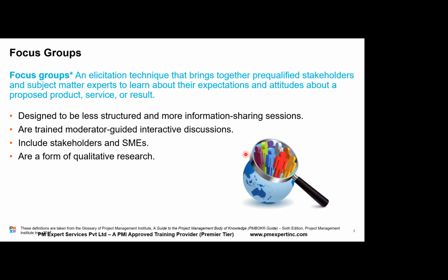Now, the second technique is focus groups. What are focus groups? Focus groups are pre-qualified stakeholders who are relevant to the project, and the focus group activity is facilitated by a moderator or a facilitator. The key outcome of a focus group is opinions from these pre-qualified stakeholders and subject matter experts. The outcome of a focus group will never be a consensus.